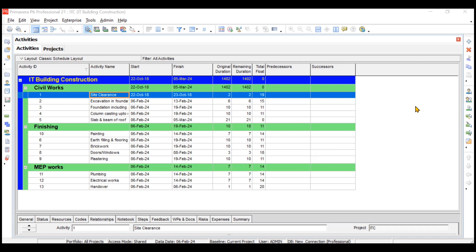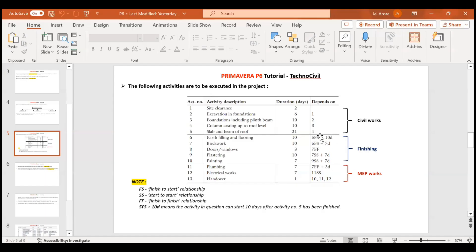In construction, more or less all the activities are related to each other. That means several activities have some relationships — maybe one activity will finish only when a second activity has finished, or one activity will start only when a second activity has finished. We have basically four types of relationships. The most common are FS, FF, and SS. SF is very rarely used in construction, but I'll be teaching you all these types of relationships.